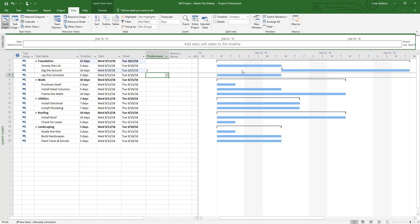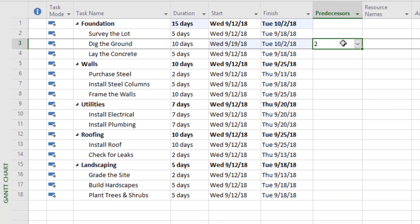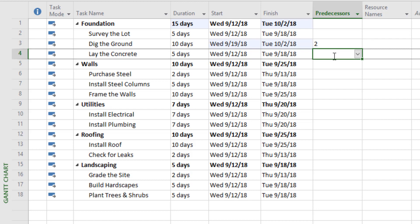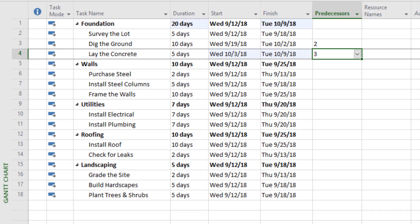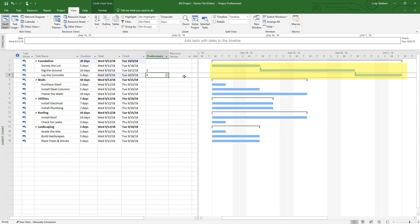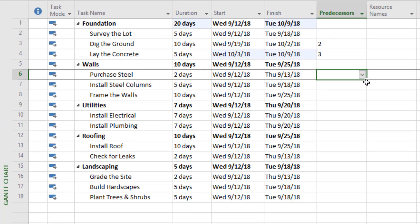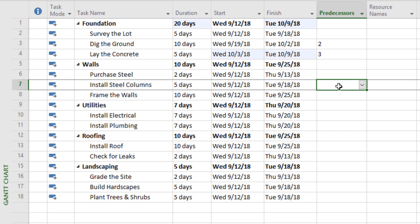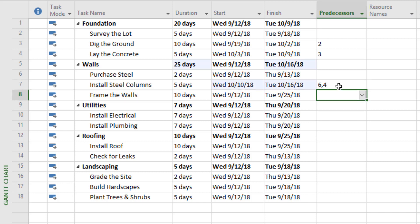Laying the concrete can't happen until we've dug the ground, so the predecessor is number three. We dig, and then we lay the concrete. With purchasing steel, maybe we can do that at the start of the project, so we could leave that blank. Installing the steel columns could have two predecessors: we have to purchase the steel, which is number six, and we also have to lay the concrete — we can't install steel columns until the concrete has been laid. Framing the walls can't happen until we've installed the steel columns, so that predecessor is number seven.